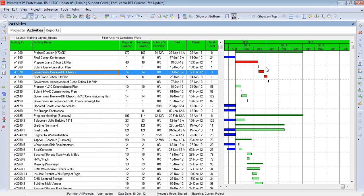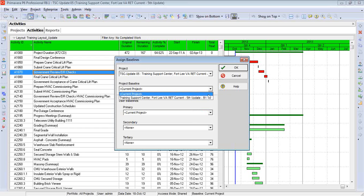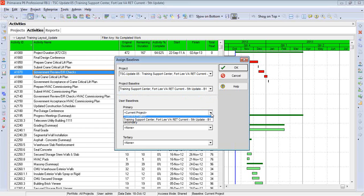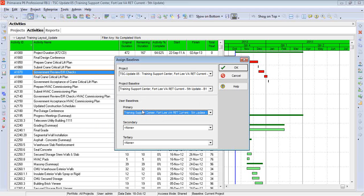So let's go ahead and close this out. The next step is we need to tell Primavera how to find this baseline — we can have more than one. So we're going to label this baseline so that Primavera can identify it for us. We go back to Project, then down to Assign Baselines. You'll see up here we have a project baseline and we have user baselines. Right now neither one is using a baseline, so we're going to switch this and pick the schedule I just created. There are certain settings in P6 where you can tell it to calculate off the primary baseline or the project baseline, so if you flip back and forth you're not looking at the right data.